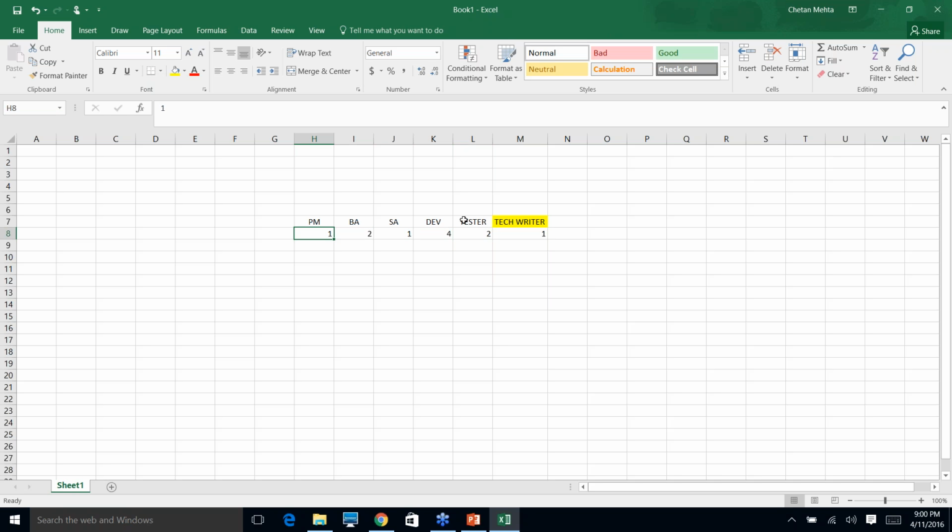So what will happen is, generally, how many developers you have? Let's suppose you have 8 developers. So you will have 3 BAs. Maybe you will have 3 to 4 testers. Right, so that's basically a rough ratio, you can say.